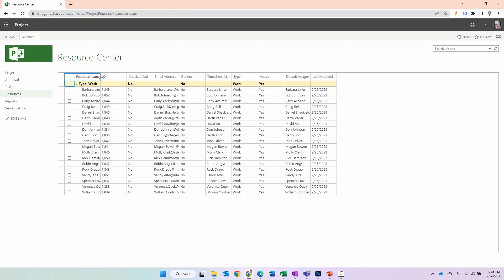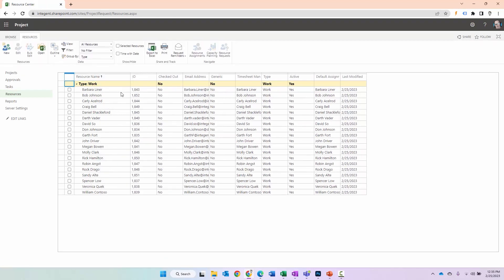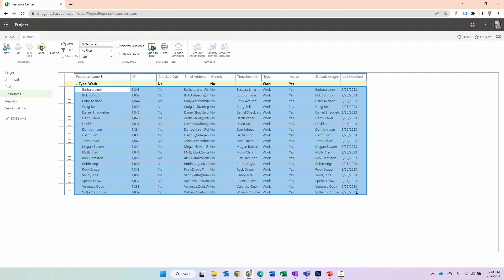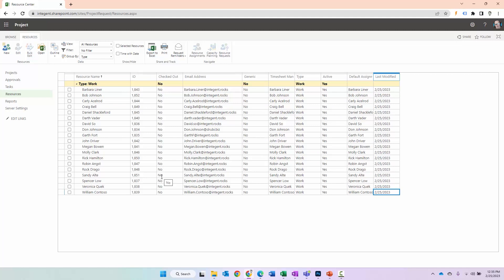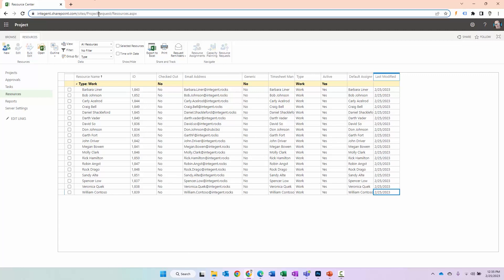What that's going to do is save and synchronize the resources currently in that resource pool. There are all those resources that can now be selected and assigned to work in my various projects. So if I'm going to build a project in Microsoft Project and I want to add these resources, I can go ahead and add them. Let's go ahead and launch Project and connect to this environment and show that those resources show up. I'm copying the URL because I need to create a connection to this environment.